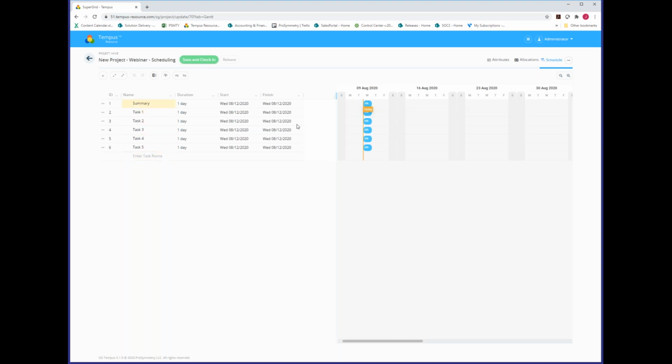All right, so we support obviously summary tasks and subtasks, and the way you can create those relationships, you could do this through the WBS, you could do it through the task information dialog box. My preferred method is to use the menu directly above the task table, so right up top here. The two that I'll refer to at this point would be the indent and outdent options. What those do, again, is basically just take anything beneath a particular task, whether we've selected one task or multiple, and it will indent those beneath, immediately creating, whether we name it summary or not, a summary task relationship.